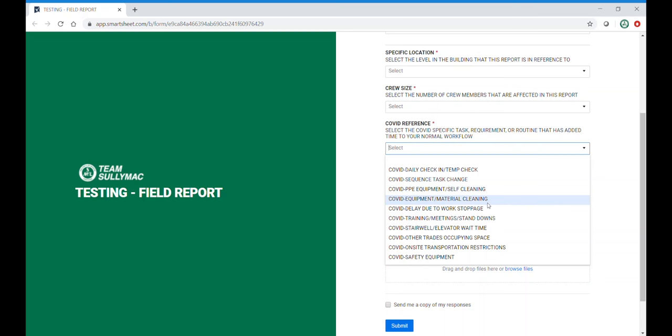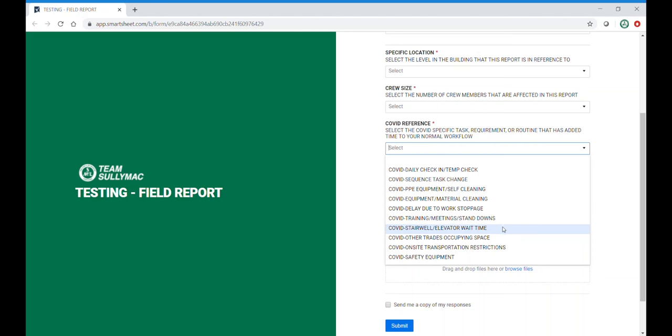Equipment and material cleaning. This would include wiping down lifts and workspace. Delay due to work stoppage. This may be due to an infected area. Training meetings and stand downs. This would also include orientation. Stairwell elevator wait time due to spatial distancing and limiting people on the elevators.